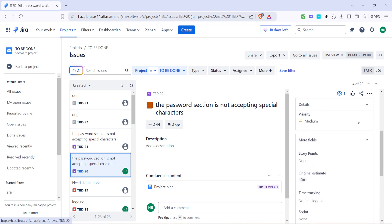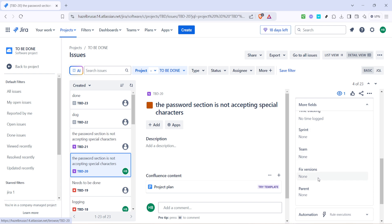The next field we're interested in is Fixed Versions. You'll find this on the right-hand side once you've clicked on an issue and scrolled through the details. The Fixed Versions field is pivotal in Jira as it connects releases and ongoing tasks, providing a mechanism to tag or associate specific versions of your software with individual issues. This makes it easier to track which issues have been resolved in which release, bringing more structure and clarity in terms of delivery timelines.